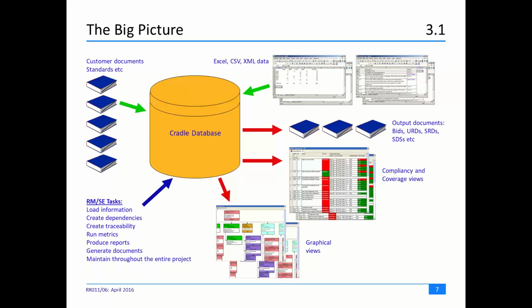So we create system requirements from user requirements. We assign system requirements to a system breakdown structure that we've devised. We apply a design process to parts of that system breakdown structure. We conduct validation and verification activities. And ultimately, perhaps within the tool, we assign acceptance criteria and monitor our progress against those acceptance criteria.